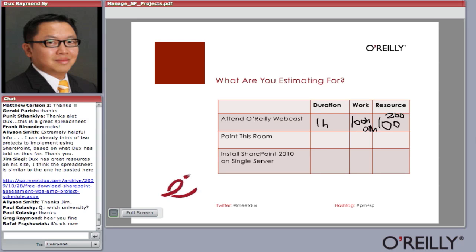So what am I saying here? What I'm trying to say is, what are you estimating for? Like this task, attend O'Reilly webcast, that's what I call a duration-based task. No matter how many people you throw in it, it's always going to be 1 hour.